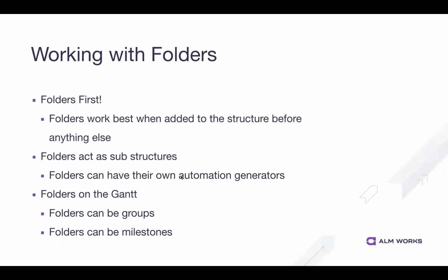I should warn you that folders work best when they're added to the structure before anything else. Adding folders to an existing structure can definitely run into some interesting behavior. It's maybe hard to explain all the different edge cases there, but if you put folders in first and then add other things, you're just going to have a much, much nicer time.